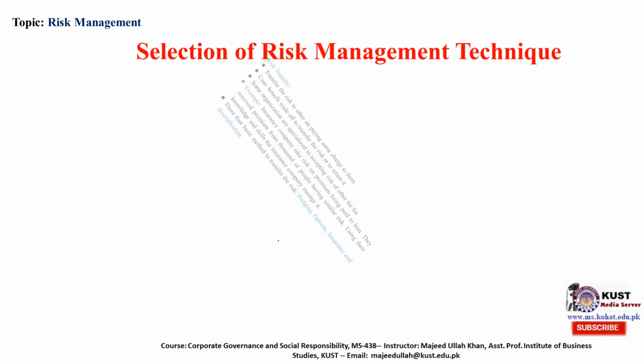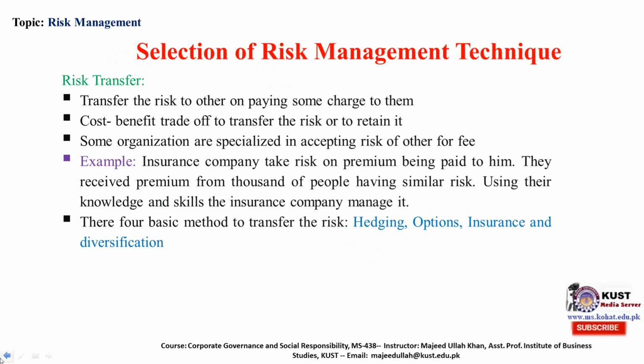Selection of risk management technique, that is risk transfer. What is risk transfer? Transfer of risk to others by paying some charges to them. Obviously, no one will be willing to take on a risk for nothing. They will obviously charge you for bearing a risk. The organization should make a cost-benefit trade-off to transfer the risk or to retain it, as in the previous example.